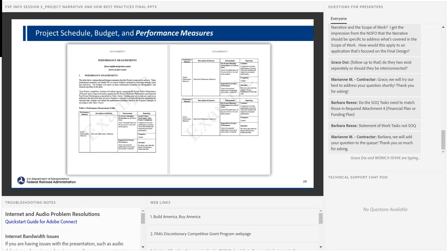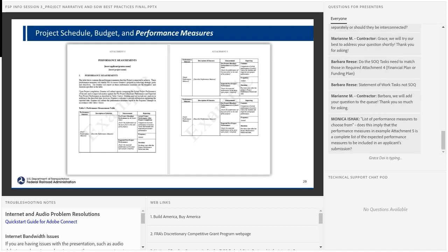For track projects, we generally do things like slow order miles or travel time. For grade crossing projects, a lot of times it's simply upgrading equipment at grade crossings. But like I said, I think there's a link on our website along with the cost categories that talks about prospective performance measures. Choose ones that match what you listed in the project narrative, and then they can be refined should your project be selected as we go towards grant obligation.